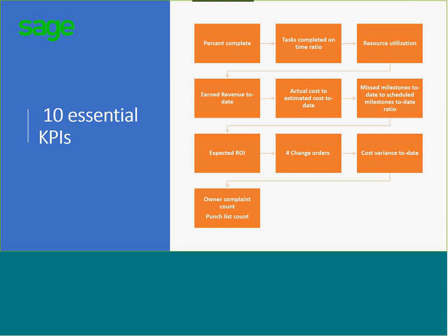And project goals in turn become schedules and milestones, cost estimates, budgets, ROI expectations, and then you start tracking the actuals, the costs, all that stuff, and you have a variance and can start putting together some metrics. These are key to get a project estimate and budget in place for revenue, cost, and profit.